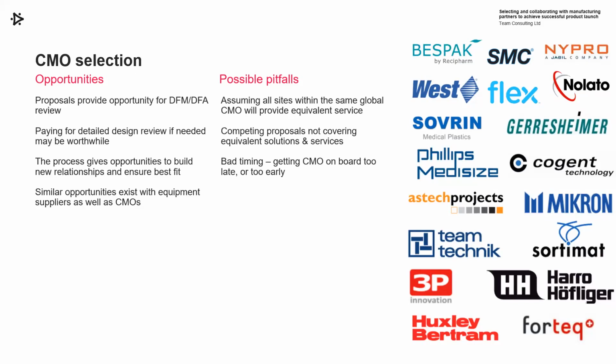Think about a few possible pitfalls. Don't assume all sites within the same global CMO, the same overall organisation, will provide equivalent service. They've often been brought into an organisation but had separate histories, were independent companies, and so you do find different capabilities and areas of expertise across different sites of an organisation. Just because it's the same name above the door doesn't mean you're going to get exactly the same thing.